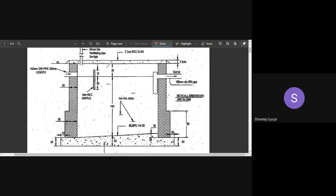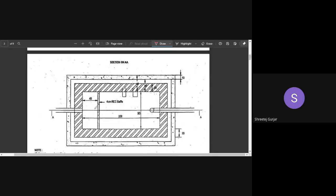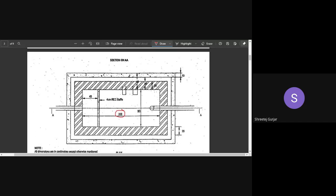From the section view, the ground level is visible. The depth of excavation is 30 + 140 + 20 = 190 cm. The width for excavation: in-to-in distance is 200 cm, plus 40 cm on each side gives 280 cm. In the other direction, 90 + 40 + 40 = 170 cm.